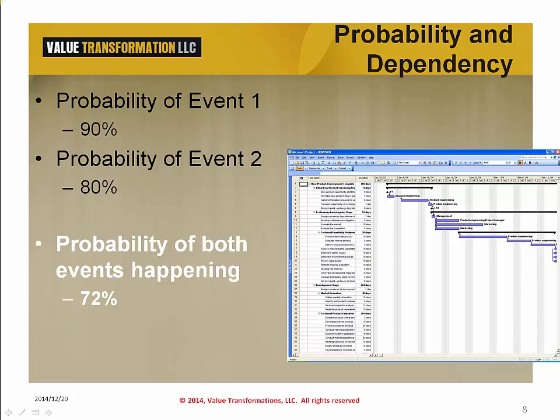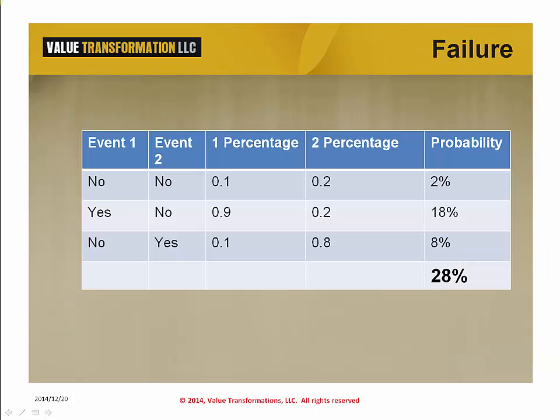The probability that both tasks will succeed is a lowly 72%. When we push our schedules that have no slack, you can already predict the outcome. There is a 28% probability that these two elements will end in some form of failure. That is only considering two depending tasks.